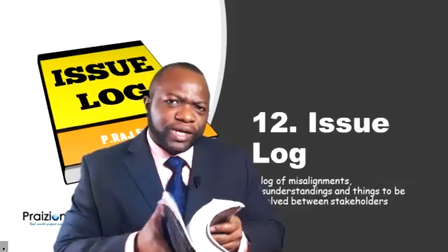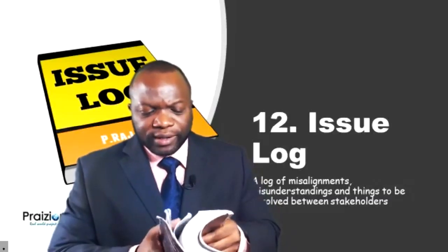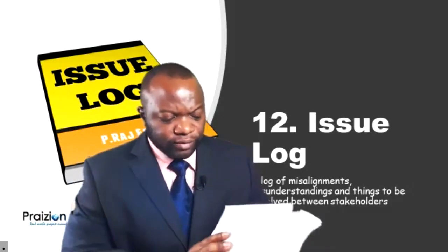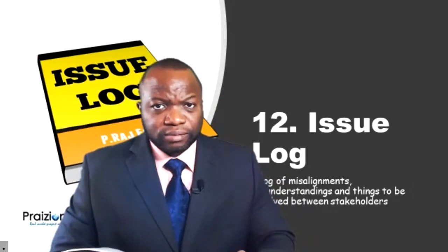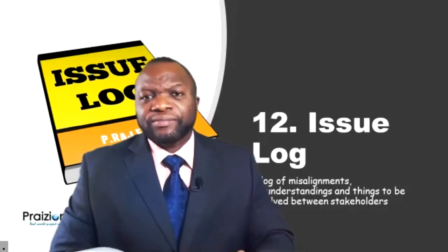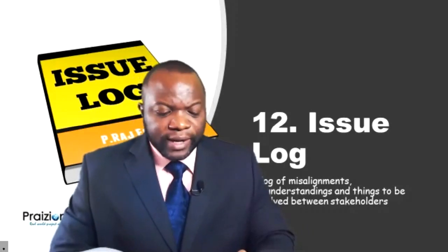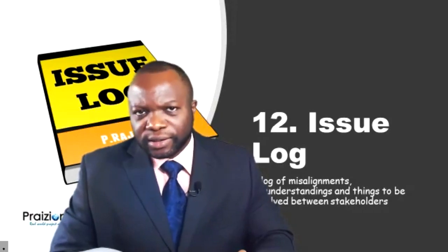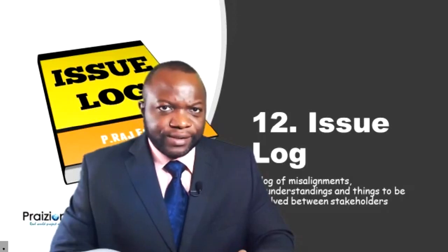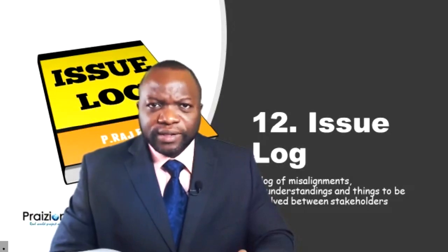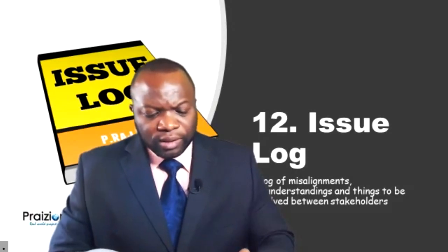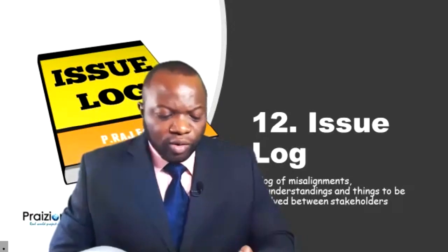Now, for good measure, I would like to show you one more thing to be aware of. In perspective, as you're studying for your exam, this is the definition of a risk. Let's read page 720. It says, risk, an uncertain event. Do you see the difference between something that is currently happening, something that unexpectedly happened, versus an uncertain event or condition that, if it occurs, is associated with risks, not issues. Issues are certain. They're happening now. Risks are uncertain. There's an if factor associated with them. If it occurs, it has a positive or negative effect on one or more project objectives.